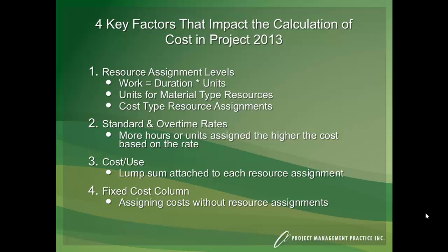And the last thing is the fixed cost column. It is possible to go to Add Column and insert a fixed cost column, which is completely separate from the resource sheet, and add costs to any task or milestone that has nothing to do with assigning resources. And these are really the key things that impact the calculation of cost in Project. So together with this knowledge, you can really optimize your schedule and master the use of Project.